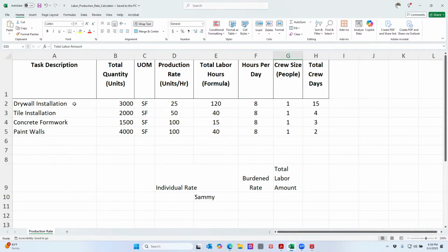so we have these tasks here that we have to complete, and maybe you're working on pricing or estimate. The first thing we want to do is come up with the total. So if you're doing takeoff on blueprints or on screen on digital plans, whatever, you want to identify each task, identify each installation, and then break it down by that unit of measure, right?